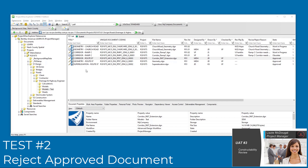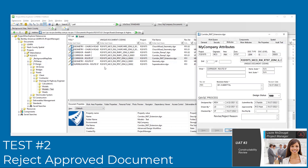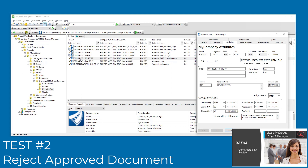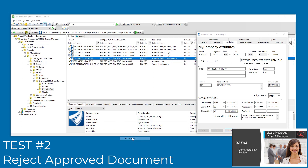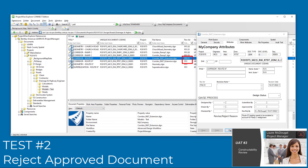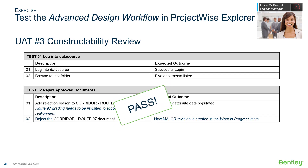Test 2: Reject an approved document. Lizzie knows that Viadotis' team is reworking the Ramp C corridor; therefore, the Route 97 corridor needs to be revised. Lizzie enters a reject reason, then rejects the document from the change state menu. A new version is created and given a new major revision number. Test 2 passes.